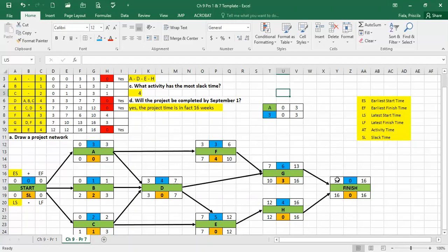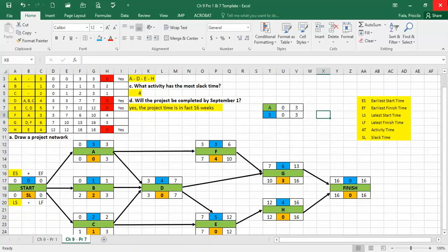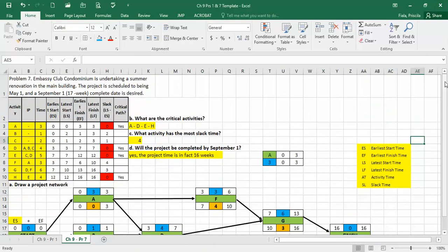I also advise you that even though I didn't assign on the homework to review the PERT formula for the optimistic, most likely, and pessimistic times and how they calculate that. Remember, it is optimistic plus 4 times the most likely plus the pessimistic, divided by 6. That's the formula. Please make sure you go through it, even though I did not assign it on the case that is due on the 15th. You will definitely see it on your midterm. And never hesitate to contact me if there are any questions.